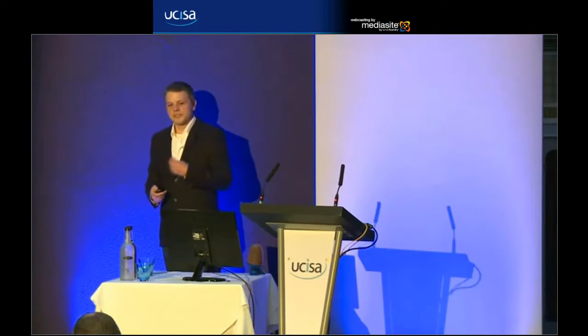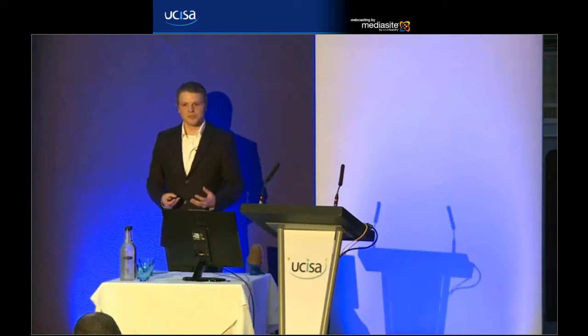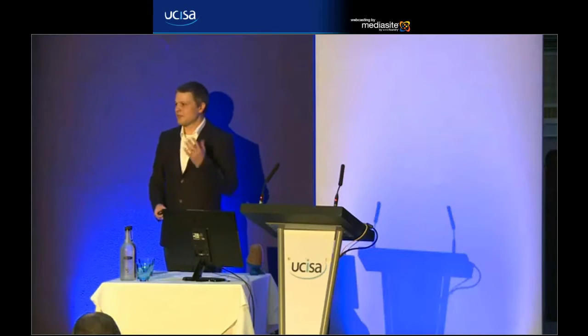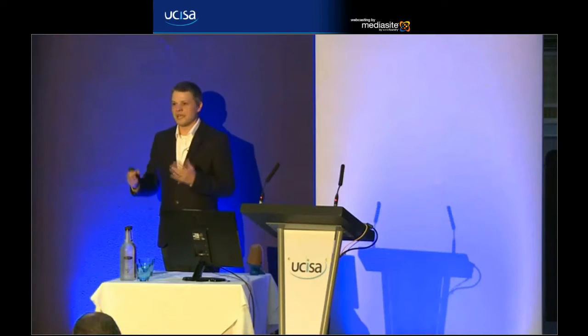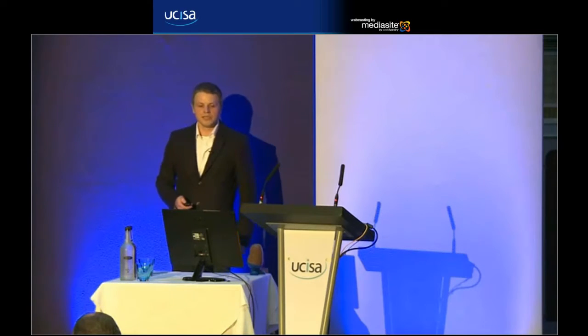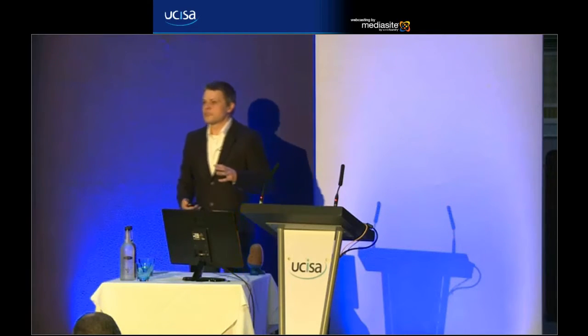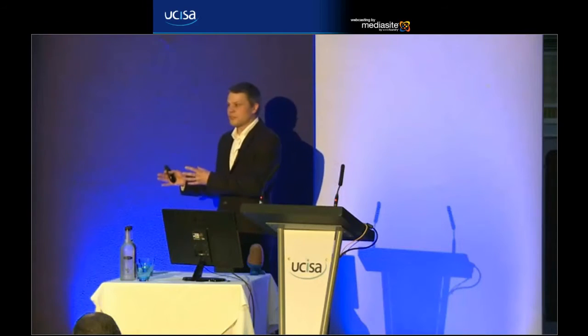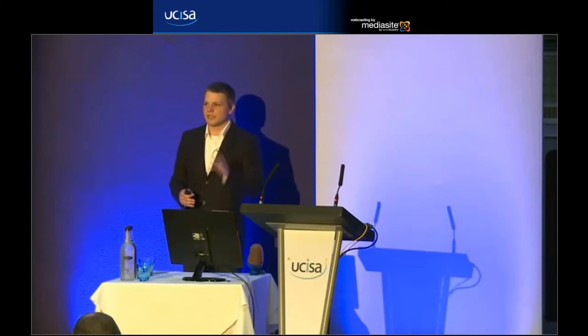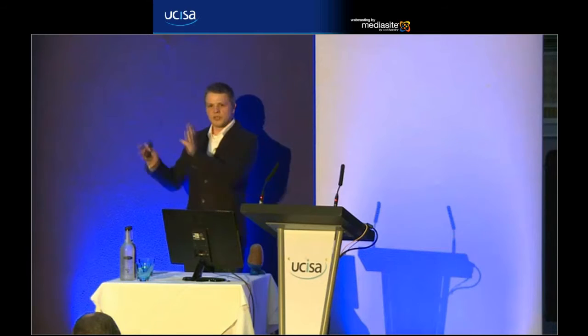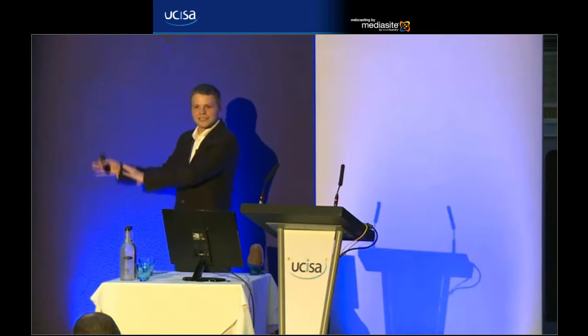We then have the could-haves. These are the optional items, the functions that people want to see, and absolutely, if we're storming ahead and we've got time, we'll put as many of these ones in as well. And there may be things that we'll say that we won't have. These are perhaps perfectly good ideas, but we say right at the outset, we're actually not going to do this at this point. We're going to leave that perhaps for a later project, do it again at a later time.